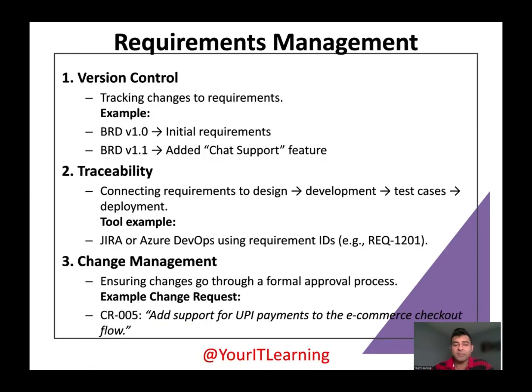Change management, ensuring changes go through a formal approval process. For example, a change request like CR-005. So this means this is change request number 5, add support for UPI payments to the e-commerce checkout.